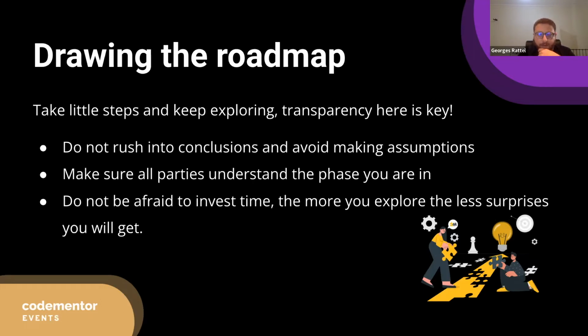It only happens during the testing phase. But this is the easy part. It gets complex after you start testing certain components, and then you move on to other components in the development, and then testing other components. And then suddenly you realize that the client was giving you feedback on an earlier component that you provided earlier and that they had the chance to test earlier. And this is where it gets messy.